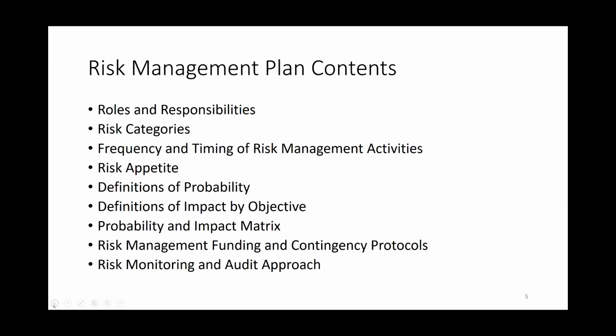Yeah, perfect. So very early in the project, you'll develop a plan for how to deal with risk. And that'll be based on, like I said, the criticality of the project, the size, the complexity, maybe if there's any one objective that's very tight, like a tight schedule or a fixed budget, you'll want to focus on that. So you'll look at roles and responsibilities, categories, then how often we're going to do risk management activities, and then this concept of risk appetite.